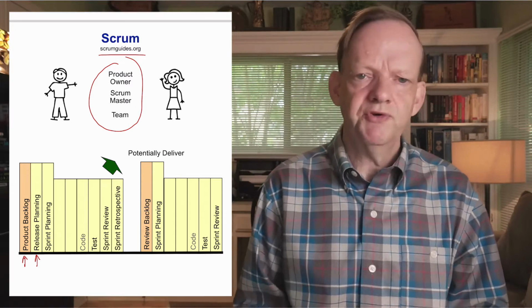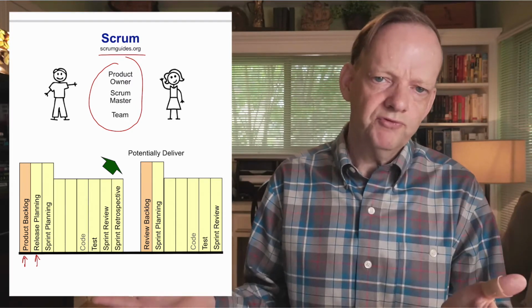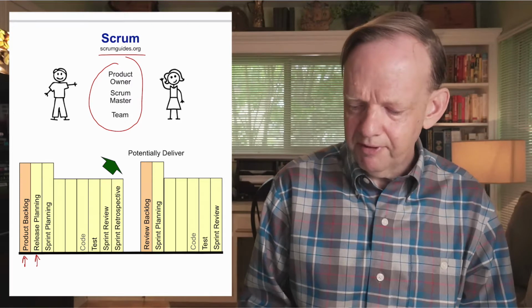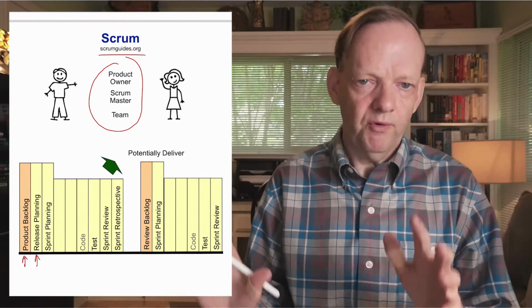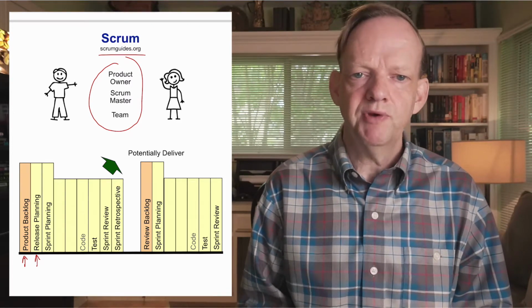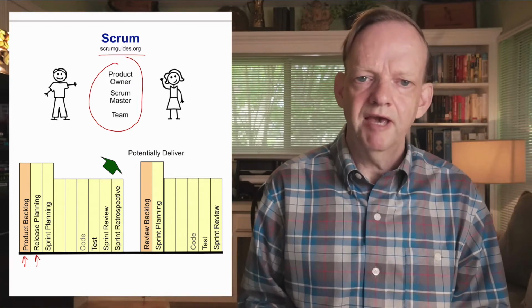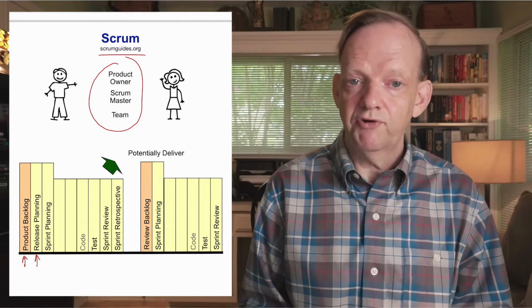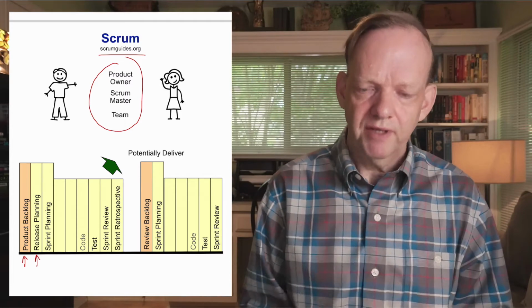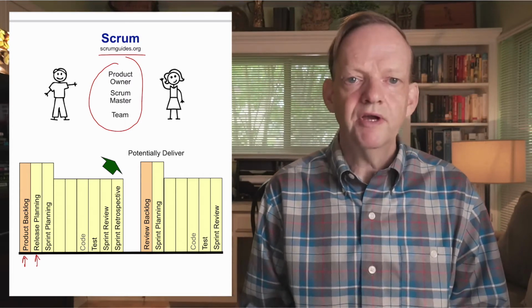The idea is that you have a bigger scope. I think the word they use now is product goal. But whatever the words actually are, it means you have a long-term perspective, maybe 3 or 4 months out, of what you want to plan to release to the customer downstream. And then we go through sprint planning.